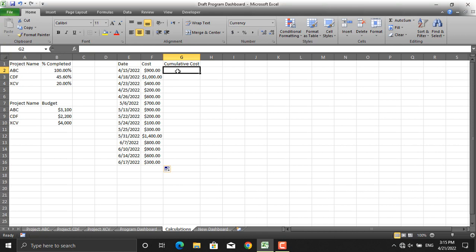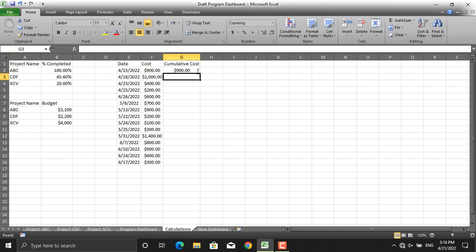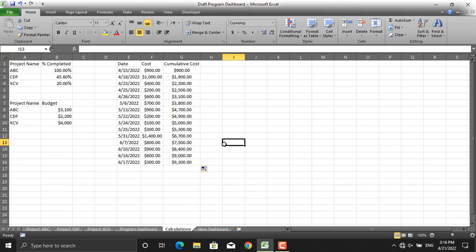The cumulative cost formula equals the SUM from the first cost cell — with the column and row locked using an absolute reference — down to the current row. This way, as you drag the formula down, the start stays fixed while the end extends. For the next row it should be 1900, then 2300 (adding 400), then 2500 (adding 200), and so on. To plot the cash flow diagram, select the entire area, go to Insert, and insert a line chart.